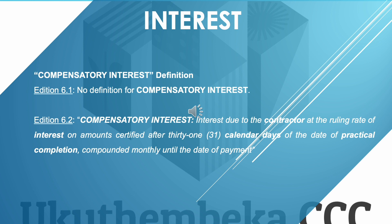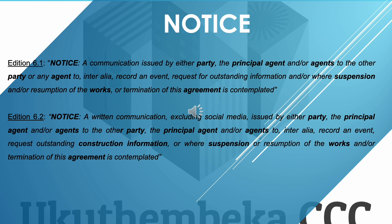Compensatory interest was also not used in Edition 6.1 but is used in Edition 6.2. The definition reads: 'interest due to the contractor at the ruling rate of interest on amounts certified after 31 calendar days of the date of practical completion, compounded monthly until the date of payment.' Default interest therefore relates to payment, while compensatory interest relates to certified amounts after practical completion.